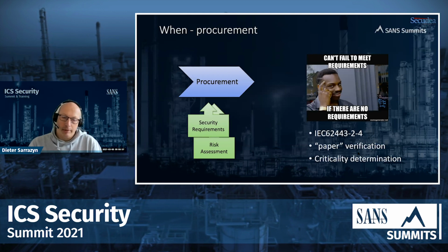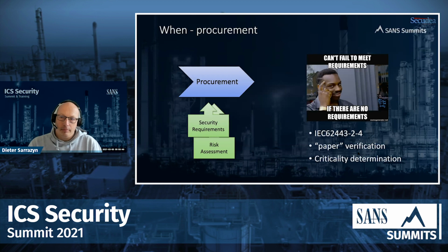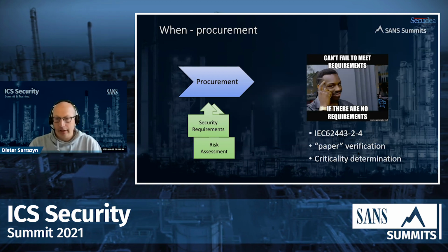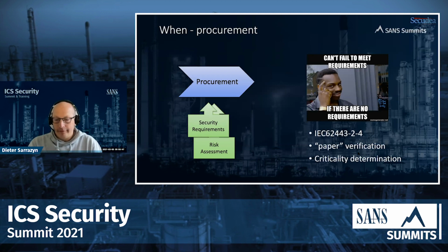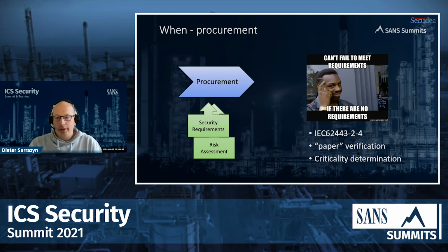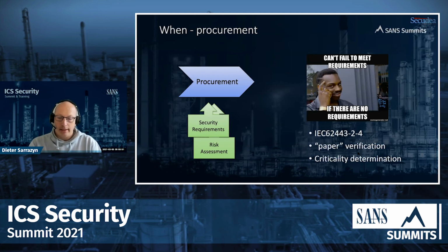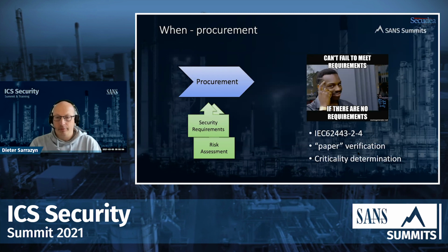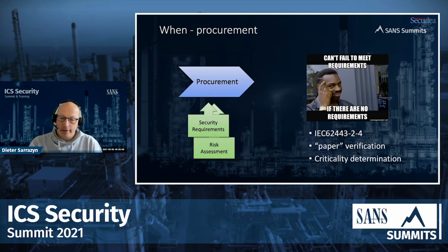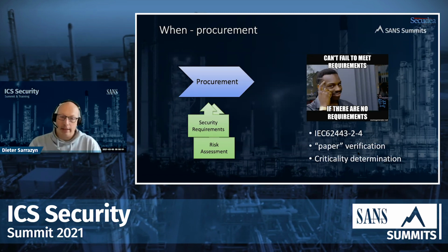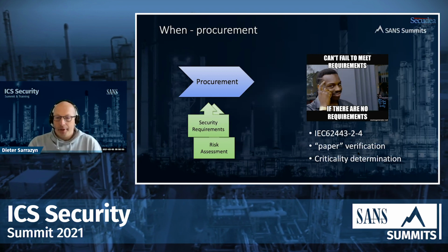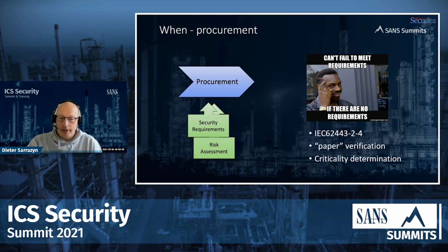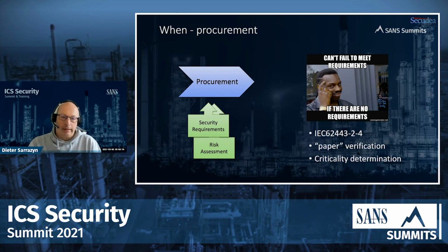And you also have to keep in mind that the security testing within the procurement phase is actually a paper verification of what the vendor promises to be doing on security elements. So he might say, yeah, we will do patch management, for example, for Windows systems in a virtual server environment. We will have antivirus installed. We will do hardening and all the kind of things that he promises. But in this phase, it's only a paper verification. It's only a check. Okay, it will be done. Good, perfect.